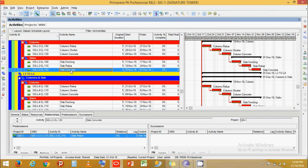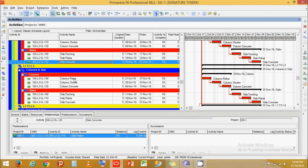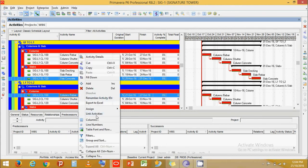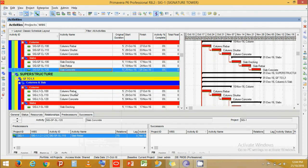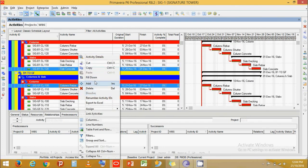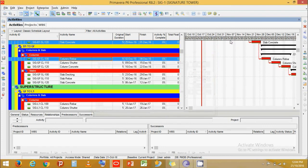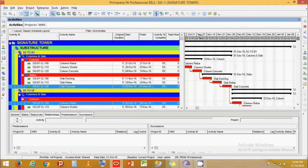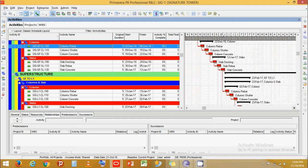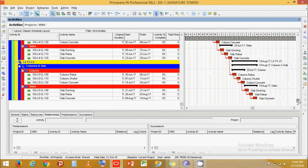Do the same for all other levels — select each pair of activities, right-click, and link them. Repeat for all remaining levels up to L5. Now you can see all links are in place. Let's schedule. We have created a slab schedule up to five levels. Thank you for watching — until next time.